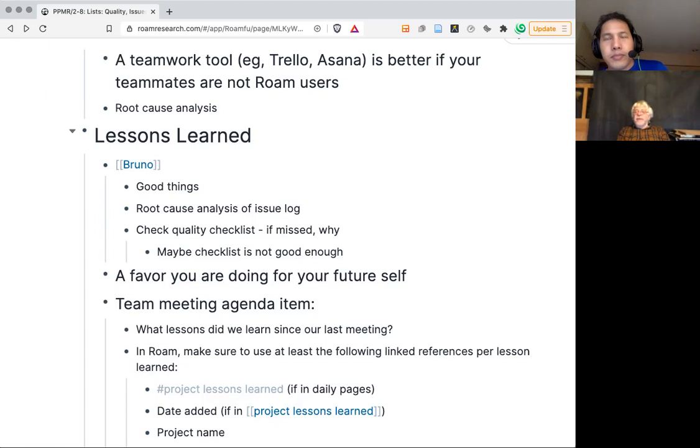So in my future project, I must put in a work package for assessing the libraries that are going to be used and which are critical. That's the kind of feedback you can also get from the quality checks and put back into the lessons learned.